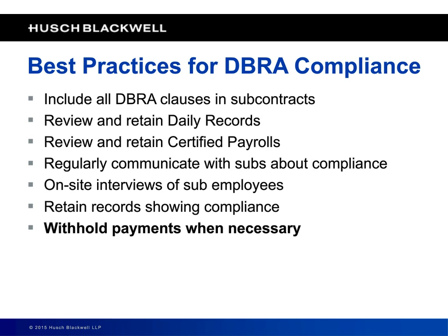Once you pay them, it becomes more and more difficult to insist on compliance. And again, at the end of the day, the Department of Labor holds the prime contractor responsible for compliance. So this power of the purse is your leverage over the subcontractors to make them see how important it is to comply.